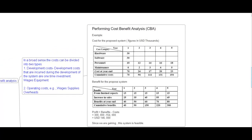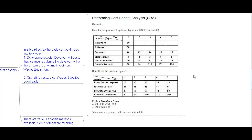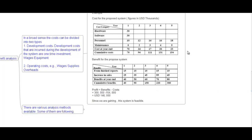A cost-benefit analysis is done year-by-year — for example, over five years — considering hardware, software, personnel, maintenance, and community costs. The cumulative cost might be 150,000 and cumulative benefit 300,000 over five years. Profit is calculated as benefit minus cost. In this example, the profit is approximately 146,000, meaning the system is feasible and we will go ahead with it. Various analysis methods available include: net present value analysis, payback analysis, net benefit analysis, cash flow analysis, and break-even analysis.